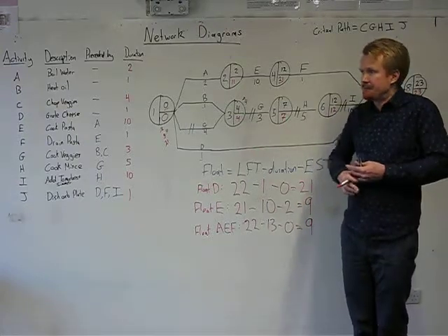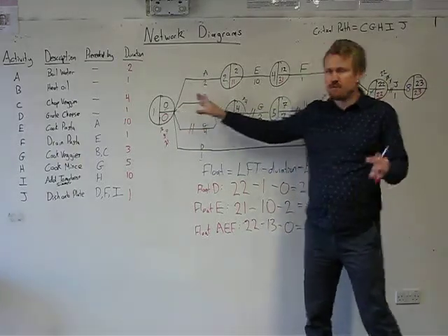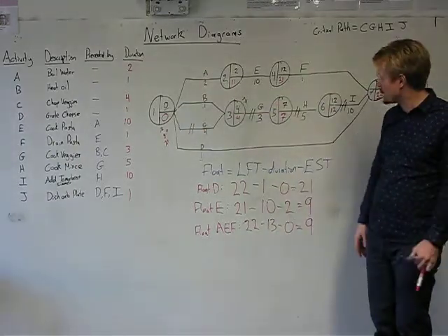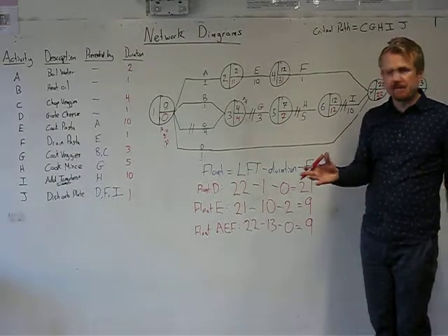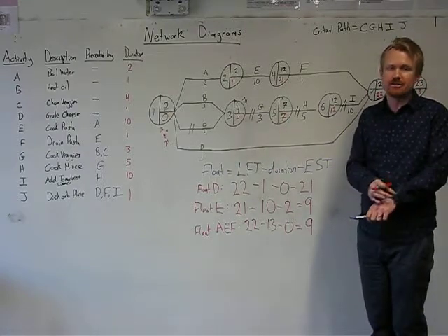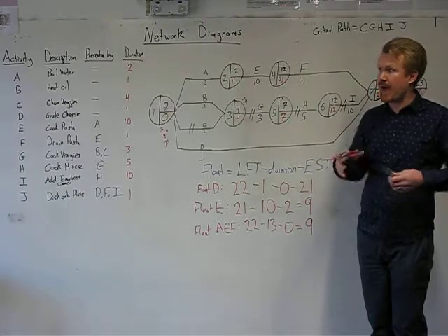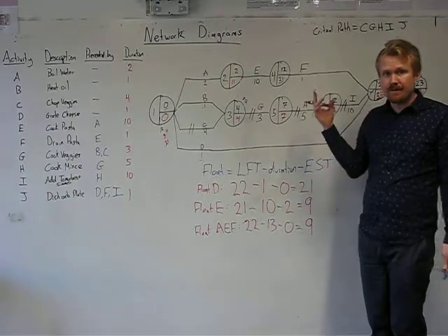So it's probably best to get your pan and your veggies going before you start to worry about your pasta. Just so that we're clear, if you try to calculate the float time for any critical path activity, it will be 0, because by definition the critical path activity is the one that you cannot afford to delay without delaying the overall project.